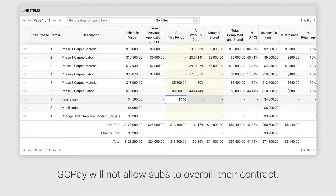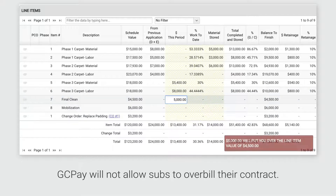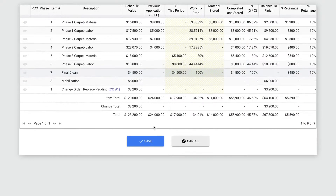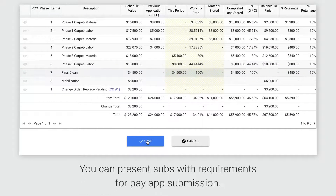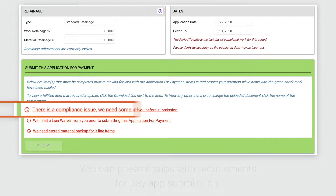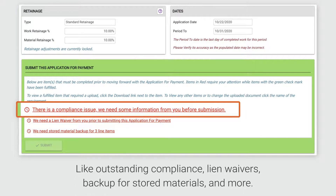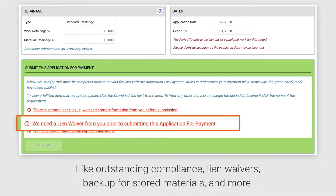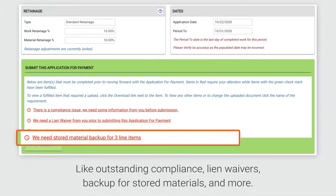GCPay prevents subs from overbilling any part of their approved contract. At submission of a payment application, you can present subcontractors with any number of requirements. For example, you could require subs to upload outstanding compliance requirements, submit a lien waiver, or upload backup for stored materials.